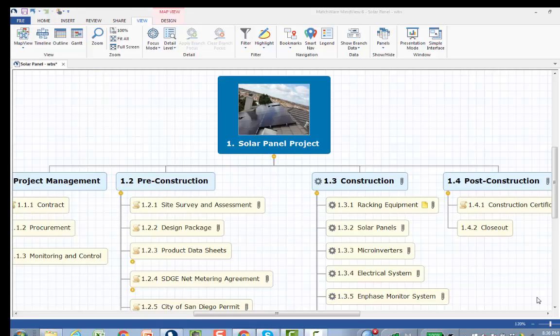This is a solar panel WBS. I created this WBS by analyzing a statement of work. Let's look at some of the other information sources I was able to incorporate into the mind map software, into the WBS.